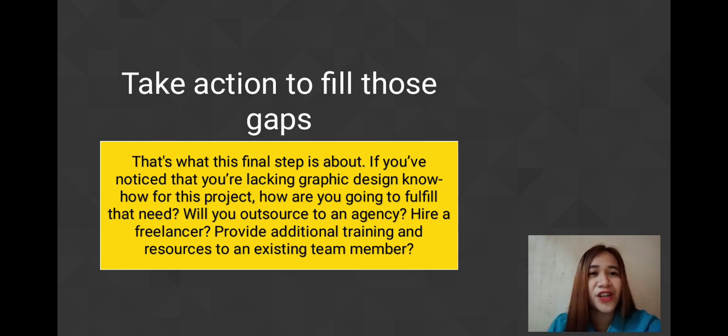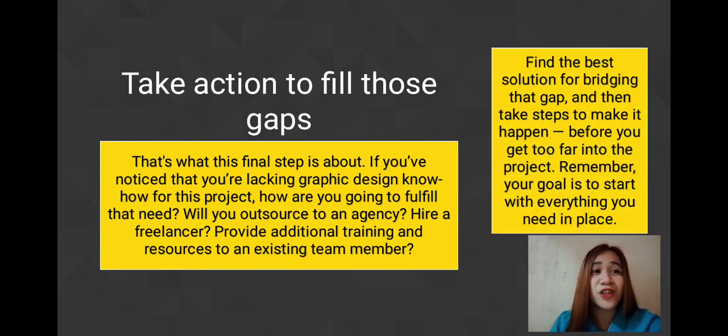If you've noticed that you're lacking graphic design know-how for this project, how are you going to fulfill that need? Will you outsource to an agency, hire a freelancer, or provide additional training and resources to an existing team member? Find the best solution for bridging that gap, and then take steps to make it happen before you get too far into the project. Remember, your goal is to start with everything you need in place.